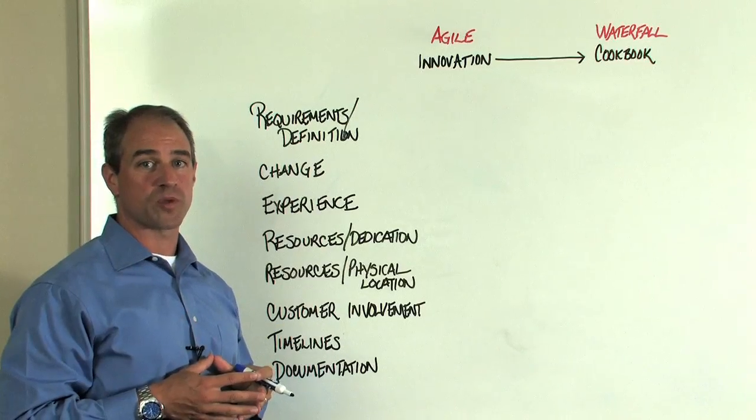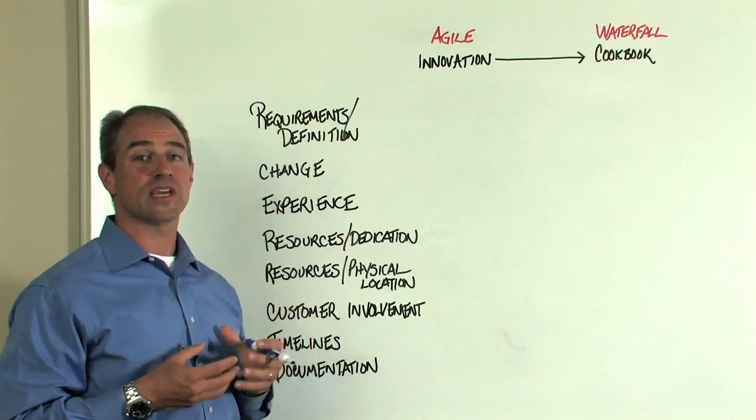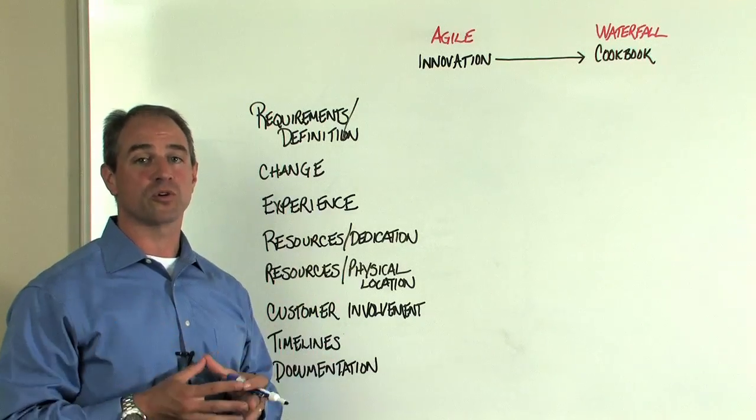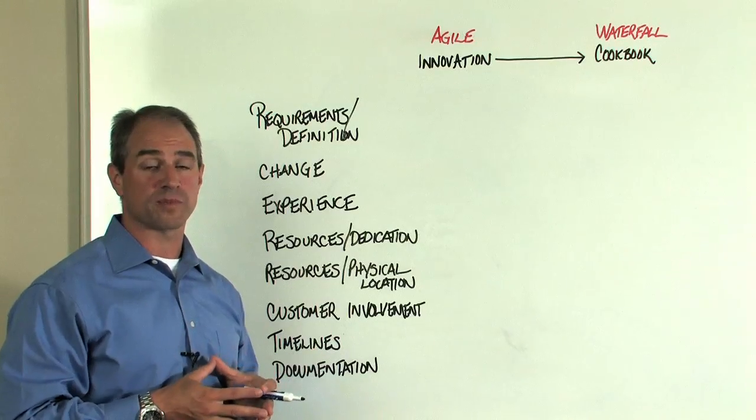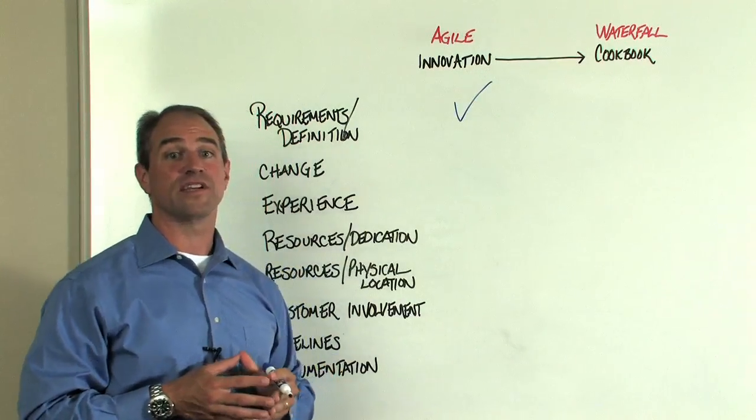Requirements or the definition of the scope of the project. Is it changing or is it stable? Let's say that your requirements are constantly changing and that as you unveil more information, you create new requirements or other requirements may fall off. So that puts you closer towards the innovation side.